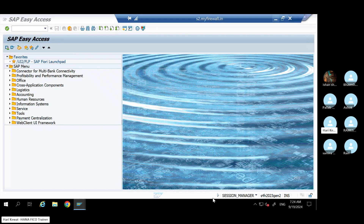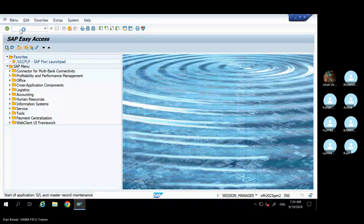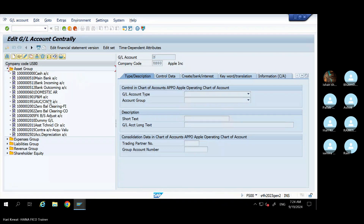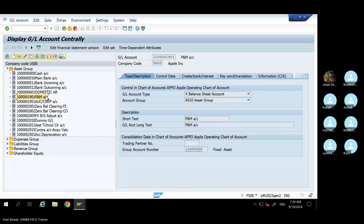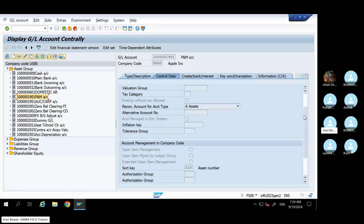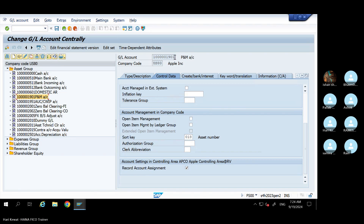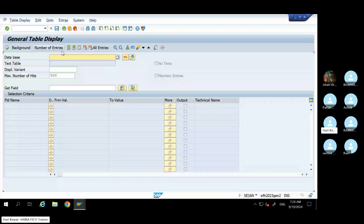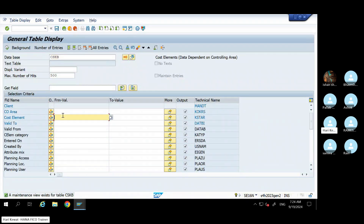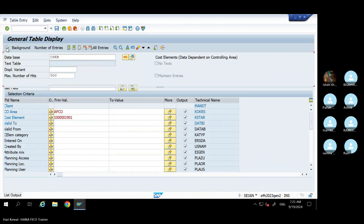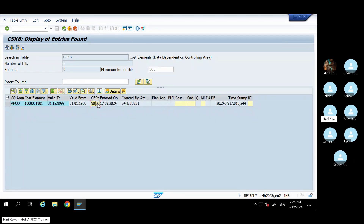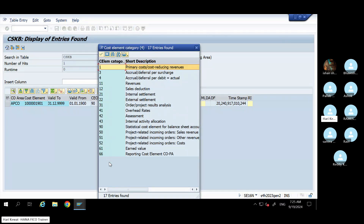Go to FS00, take your plant and machinery GL, go to the Control Data tab, and tick 'Record Account Assignment.' If you tick this, then this GL will become a statistical cost element. You can verify this in SE16N using table CSKB — give this GL and your controlling area, run it, and you will see cost element category 90 being picked up. It is: statistical cost element for balance sheet account.